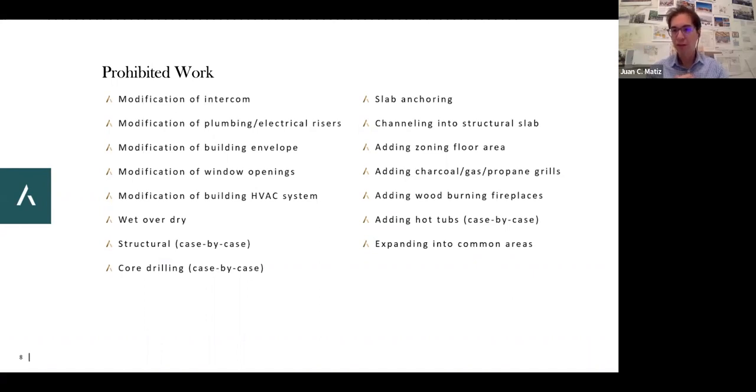As Chris said, the Department of Buildings and the code interprets that even a stud wall is, quote unquote, a structural member, which is why modifying a wall and taking down a wall or putting up a wall is considered a permittable requirement. And it's the same if it's a 1950s plaster block that's 3 inches thick, a metal frame stud wall, or a plaster wall. The DOB just sees that as a partition or a wall surface that is technically, quote unquote, self-structural or structural.